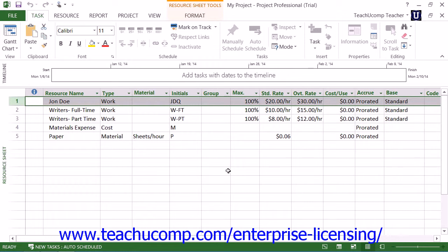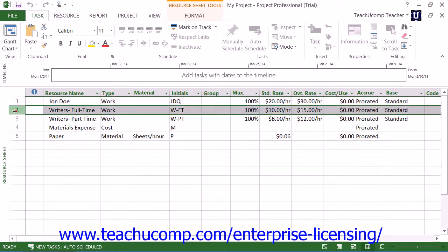to complete the task. Note that people resources can either be specific, such as a specific person with a unique or necessary skill that's required to accomplish a task, for example, a John Doe, or they can be general, such as the name of a general type of worker that's required to complete a task, for example, a writer or an electrician.